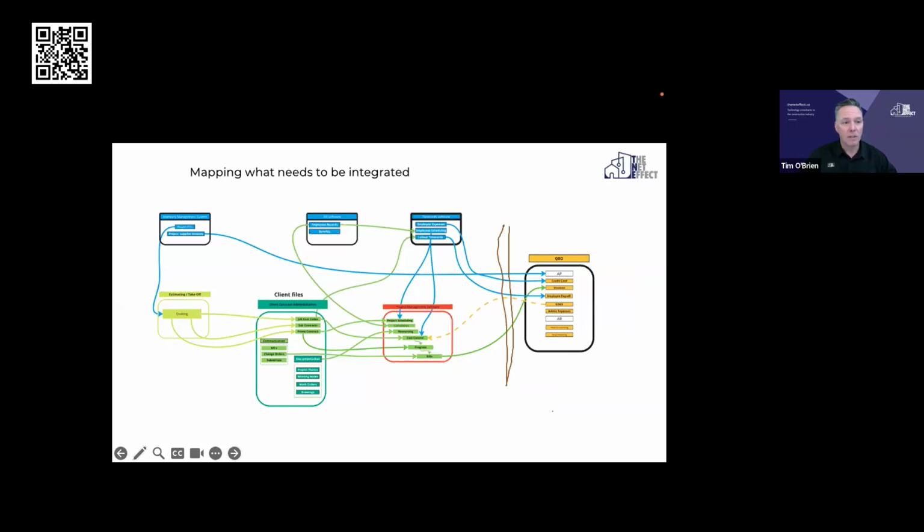If you're just sending new client information into your finance software, that's fine, but you don't want field staff making entries into the accounting software without somebody on the accounting team having their eyes on it and checking it over. So even with time cards, maybe a foreman or a supervisor checks the time cards before they're sent to the accounting software for the hours and tracking against the different projects.